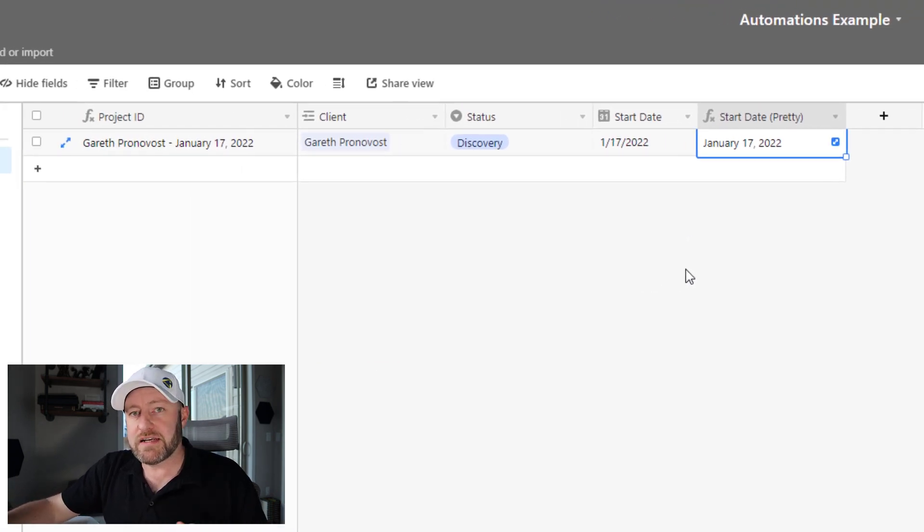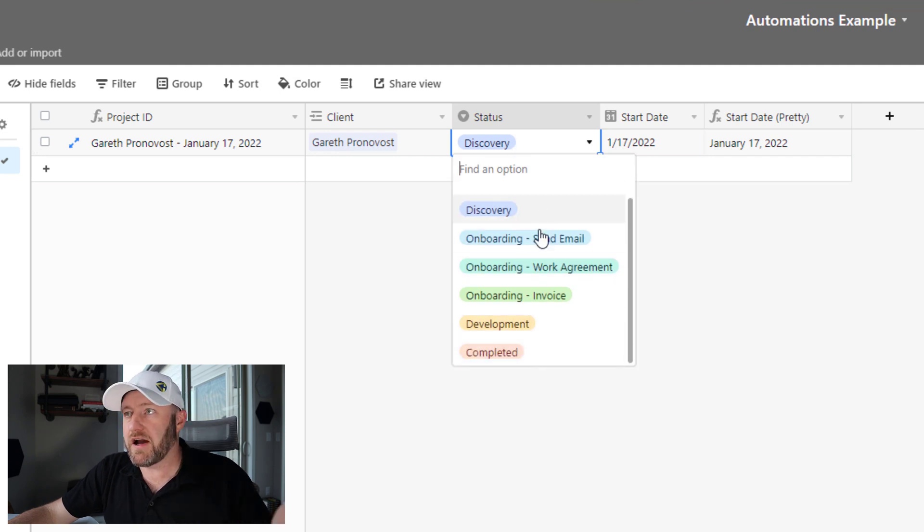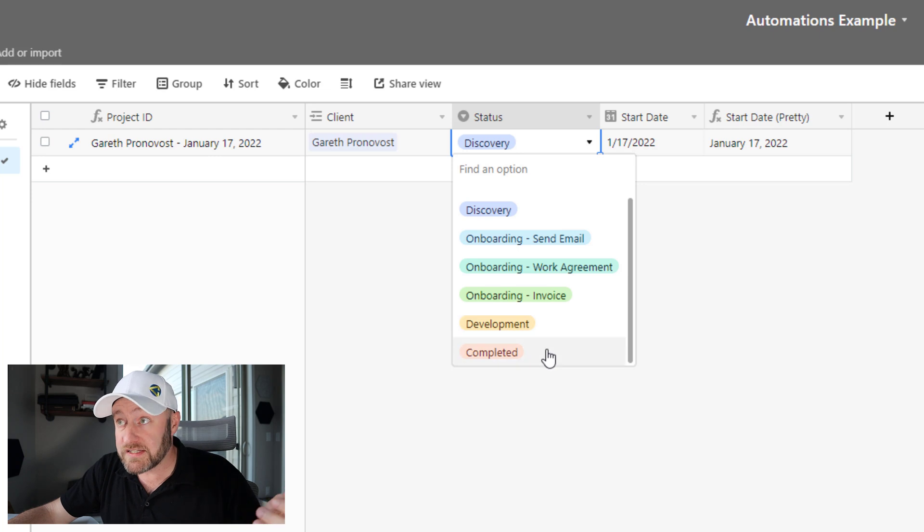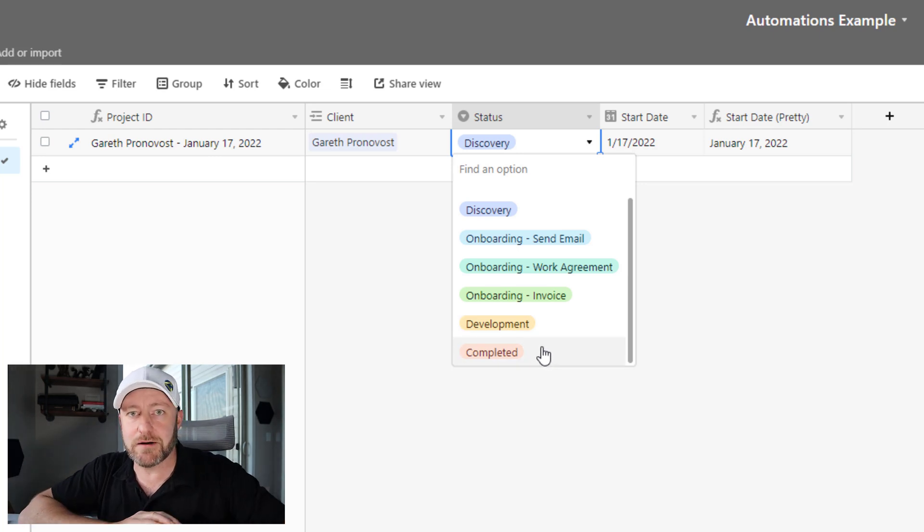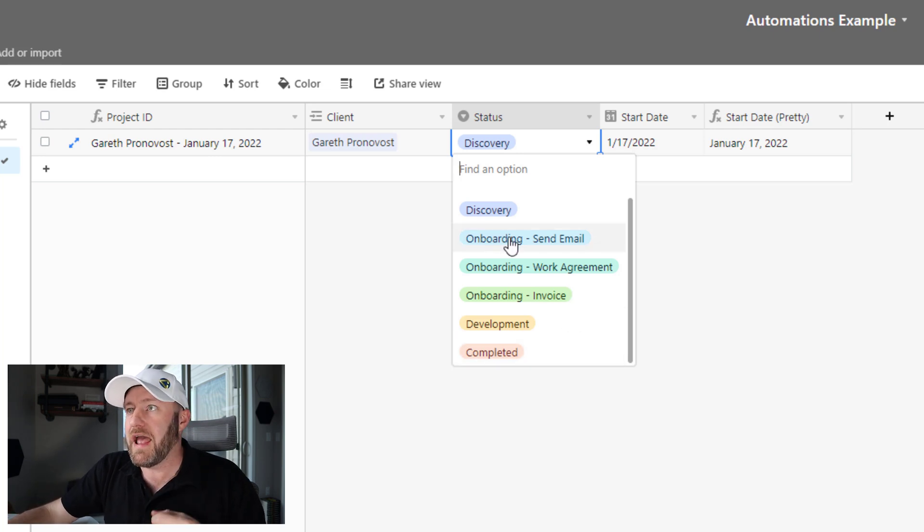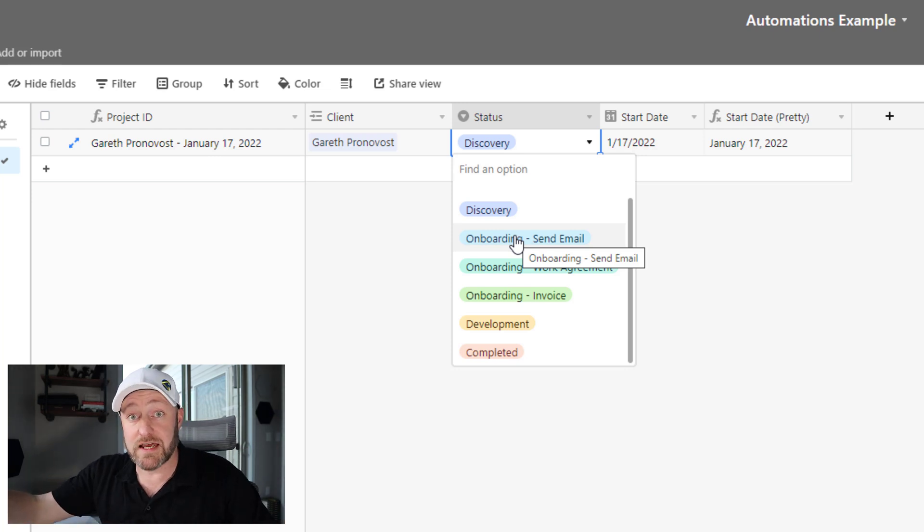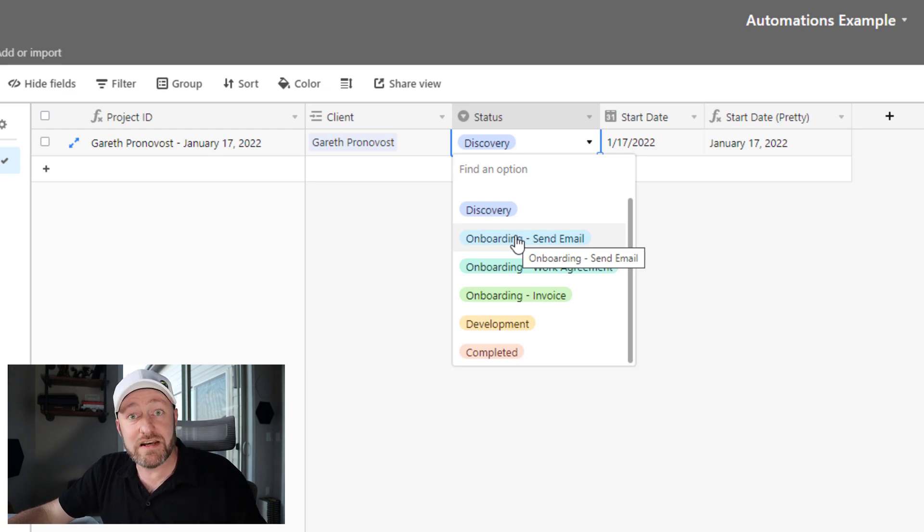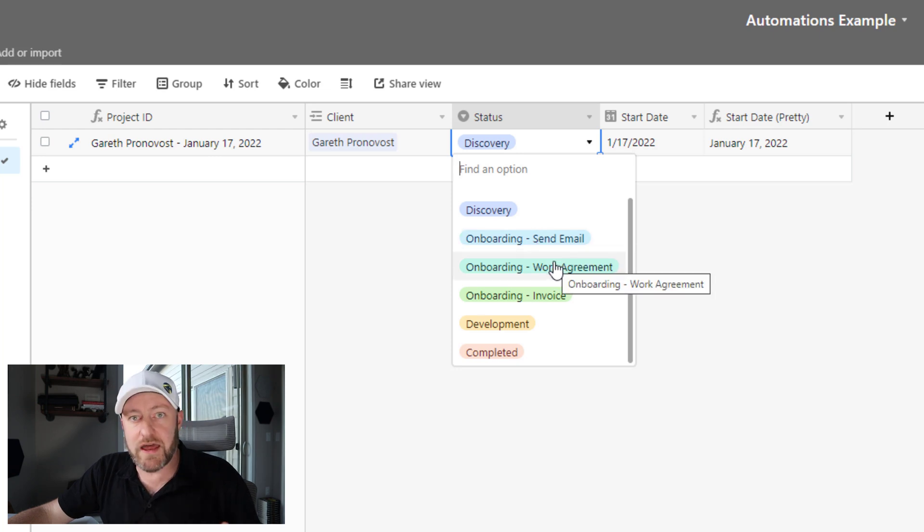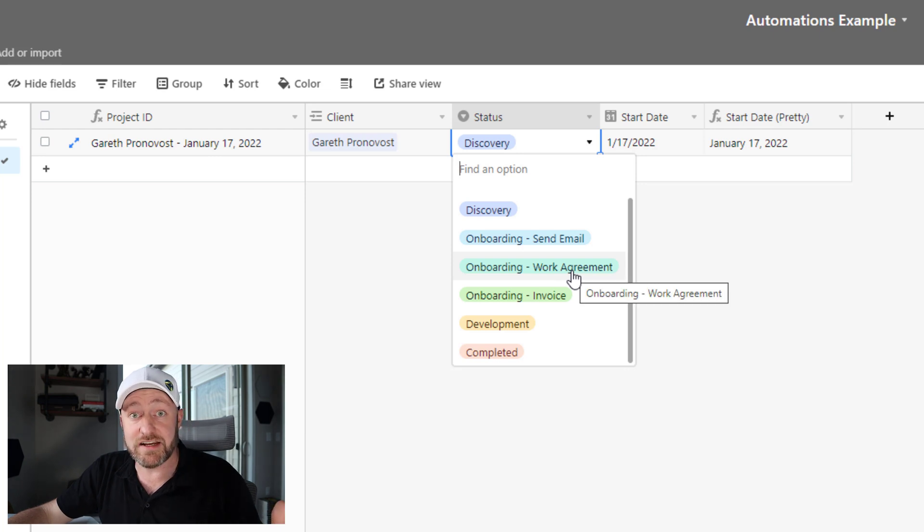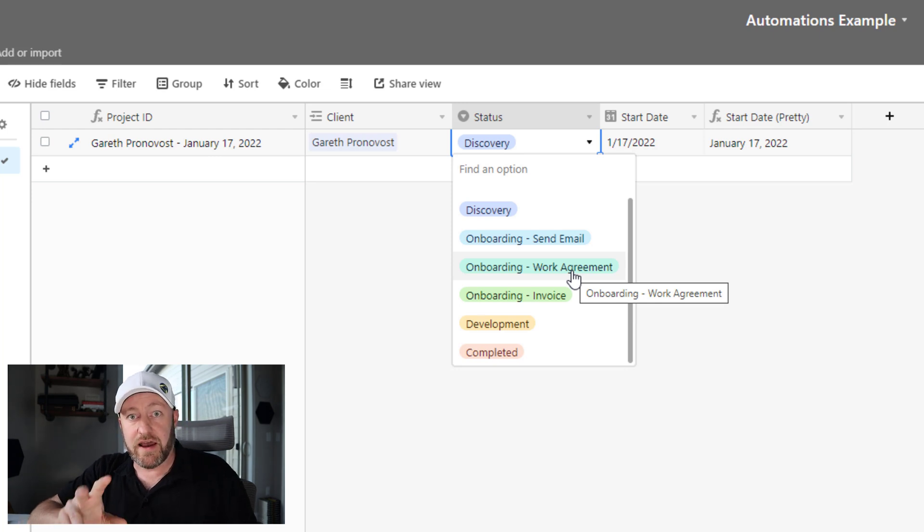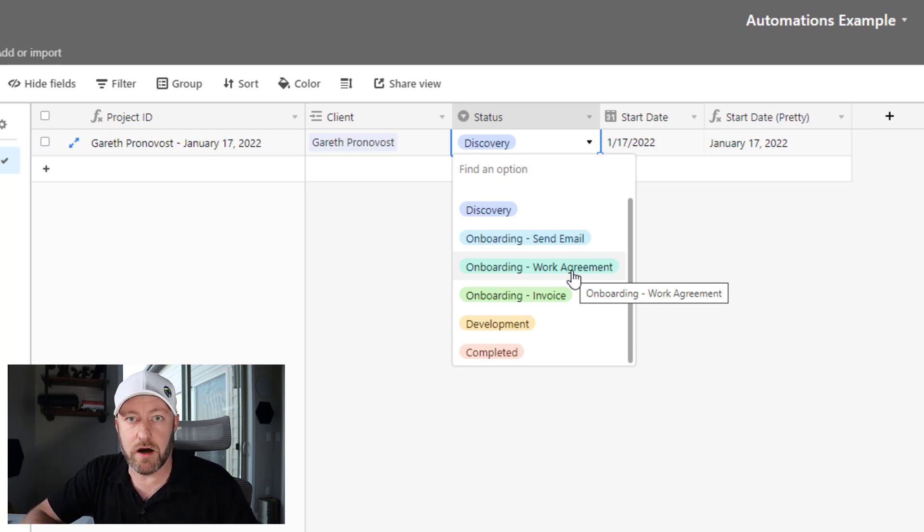So how do we send out this email? Well, we've got these different statuses: discovery, onboarding send email, onboarding sent work agreement, onboarding invoice, development is the actual project work itself, and then completed. Now these stages, the status that I'm using here is completely adjustable. Whatever it is for you is your own process. This is just an imaginary workflow. And the idea here is that when a status is changed to send email, then we need to send an email. Simple enough. Of course, at the end of that, we then want to move it into the next stage because we've now completed this part of the process. So then as an amendment to our automation, we're going to change the status and move it to the next status as well. Now we can do all of this right here inside of Airtable using automation. And the thing you need to know in starting out building automation: two key building blocks for any automation, trigger and actions.